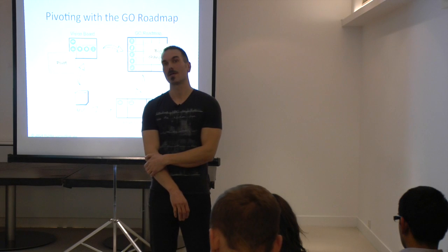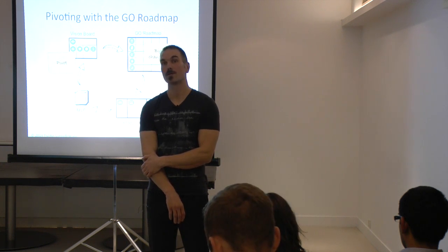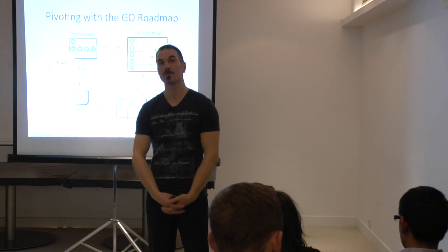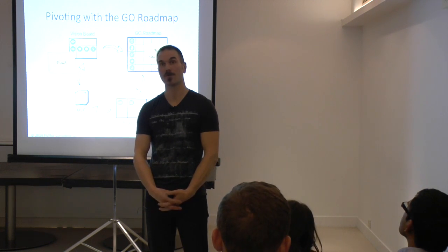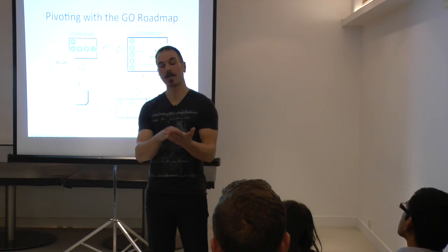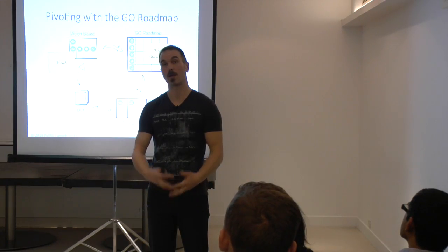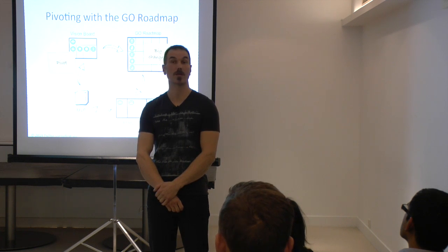Yes. Well, if you know legislation is going to change, then that's probably something that, as you said, will impact your roadmap, and I would suggest you make it transparent in your roadmap. So, one goal could be to ensure compliance. That could be the goal of a specific release, and that may mean that you have little opportunity to implement new functionality. Your main focus may be on just making sure that you can still sell your product and that it complies to the new regulatory requirements.